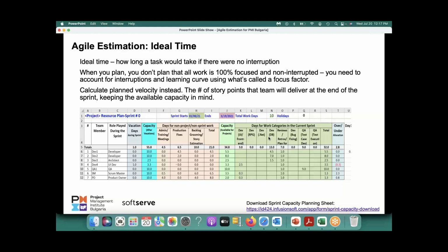And the problem was found that they would not get into this detail level. They were just doing the story points and taking those story points, matching how many people we are, and going ahead and doing that. But guess what? The effort needed or the type of skill needed for a set of stories may not be in the same proportion as your people skills are. So you need to match that. You may not be able to do everything. So in that case, this kind of a spreadsheet is very useful, and I developed it long back, and you can find it on my website, the knowledge base, and you can download it.